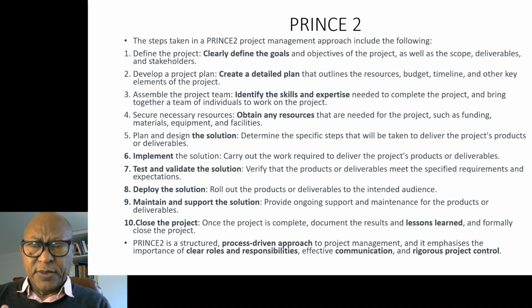Once you get the work breakdown structure, it tells you exactly the tasks required, and those tasks tell you the skills and knowledge set required to complete them. So the third stage in Prince 2 tells us who can actually do the tasks, and what kinds of roles and skill sets are required.